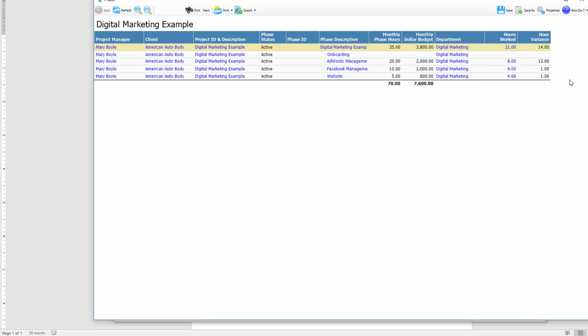If we have external consultants working on phases, we just have them supply invoices where we can post the costs into individual phases. So here we'd have this report we can use to monitor ongoing months or prior periods. Once we built this out, this report would be much longer. We'd have project manager Mary Boyle, and we would see a total for each of her clients, and we could get a total for Mary Boyle's overall performance within the company. With that, we could closely monitor performance on each project and phase.